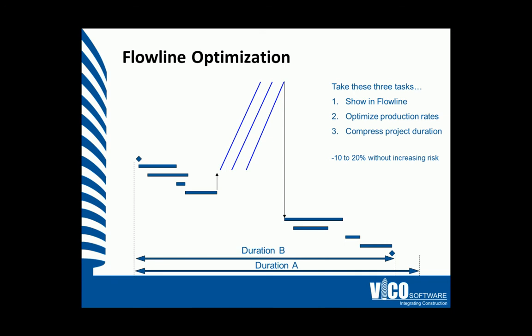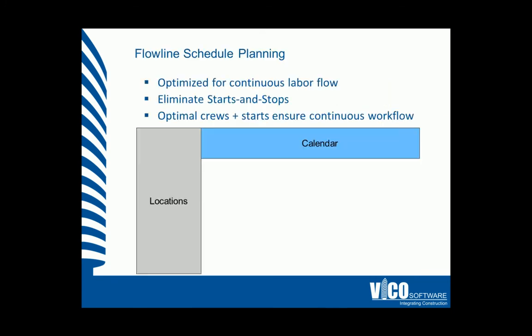Let's look at another example. The aim of flow line optimization is to plan for continuous workflow, eliminate starts and stops, and develop optimal crew sizes to ensure the continuous workflow remains constant.